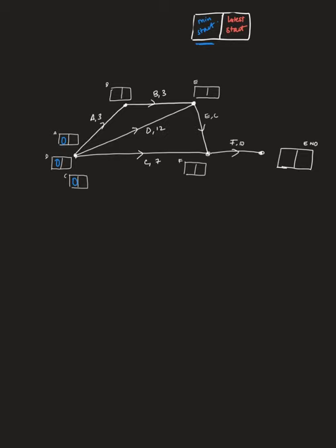Now I'm moving through the network. If I follow activity A up to this checker box here to start B, there's only one way I can get into this vertex in order to start B. So I have to travel through A. So B would have to have A completed in order to start. So 0 plus 3 is 3. So 3 in there.